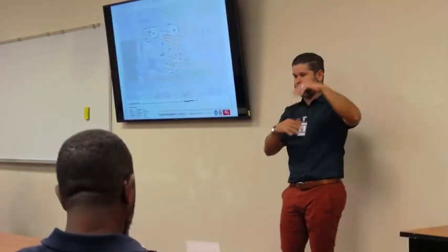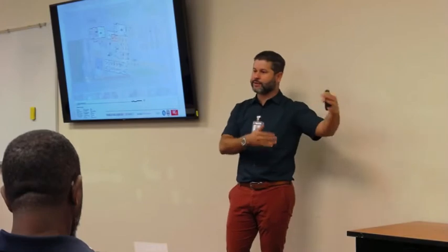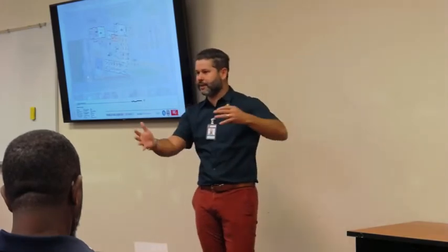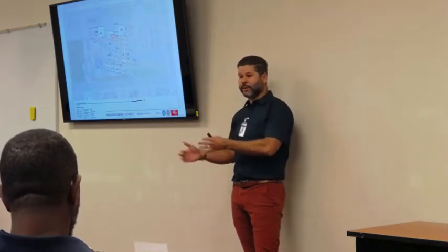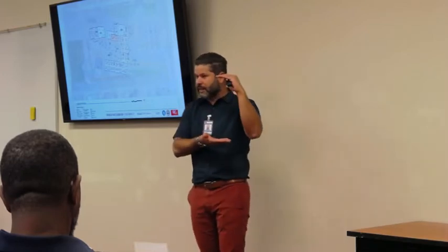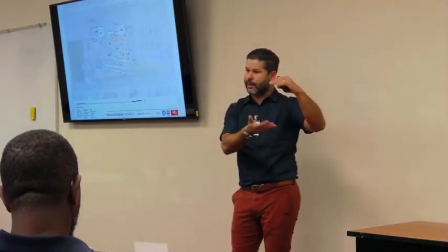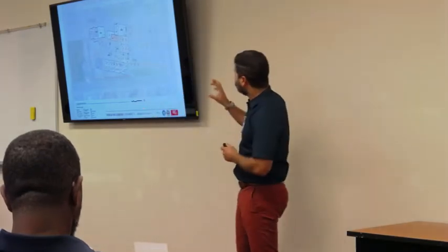So for everybody's knowledge, the process starts with the requirement from the state, SREF. You have X amount of kids, a classroom should be this size, you have X amount of classrooms with students, you should have a dining that is this big, and so on. So we created that, and then we sit down with the principal and the academic side of the district and talk about, well, this is your baseline, this is what you have at your school right now, how do we marry the two together? So it's a lot of back and forth. But then we would use that